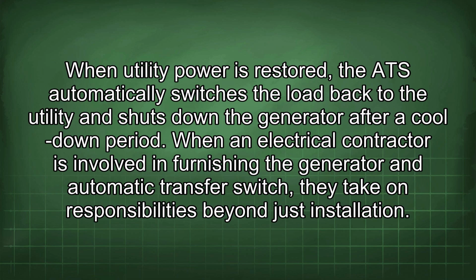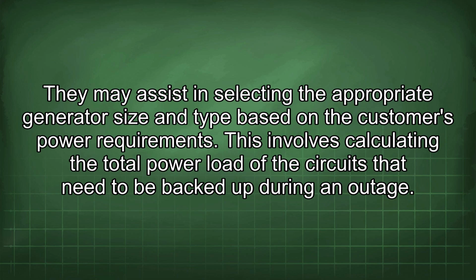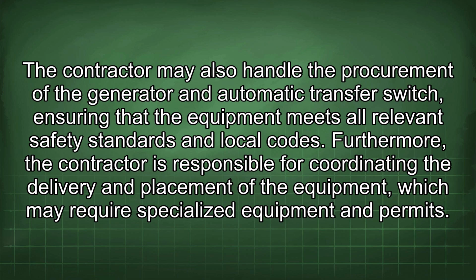When an electrical contractor is involved in furnishing the generator and automatic transfer switch, they take on responsibilities beyond just installation. They may assist in selecting the appropriate generator size and type based on the customer's power requirements. This involves calculating the total power load of the circuits that need to be backed up during an outage. The contractor may also handle the procurement of the generator and automatic transfer switch, ensuring that the equipment meets all relevant safety standards and local codes.